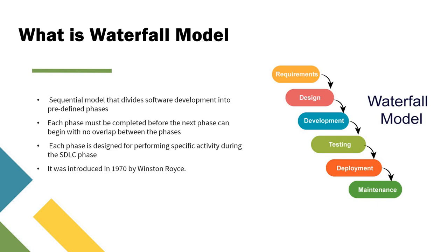So this is a sequential model that divides the software development into predefined phases, and each phase must be completed before the next phase can begin, with no overlap between the phases. So in the software development life cycle, in the waterfall model, it is divided into phases, and only at the end of the phase will we receive the software which has been developed. And it was introduced in the year 1970 by Winston Royce.